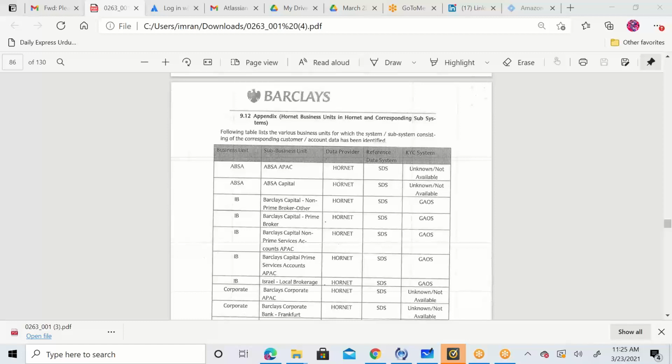But eventually the final say has to come from your team lead, maybe your project manager or team leader, business manager, and then the product owner. These are three people whom you will be sending this document. Let's suppose I've done a major chunk of it, the scope part or the functional requirement part. So I'll send an email to them that if you have time, we can set up a meeting, face to face or over the phone, and go through this document, and you let me know your inputs.